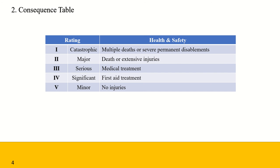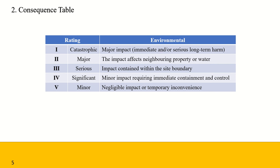Consequences are rated in terms of the potential impact on criteria, often on five-point descriptive scales linked to the criteria identified in the context. As you can see here, this table provides an example of a consequence table for the health and safety aspects of excavation projects. This table also provides an example of consequence scales for the environmental risk of excavation projects, where each rating represents the ascribed environmental consequences.